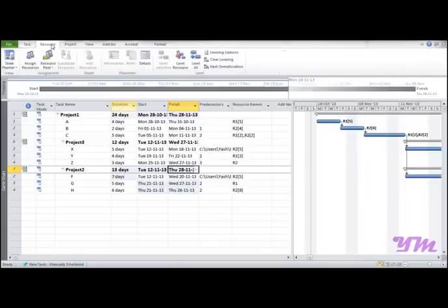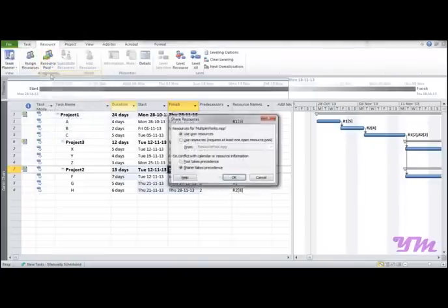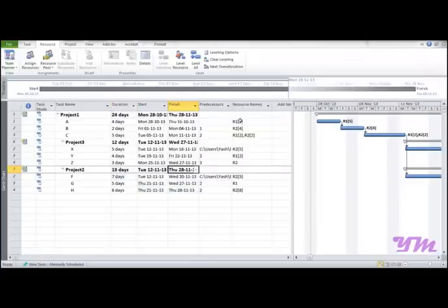Now we need to add resources here again as we did previously, that is to go to resource pool, share resources, use resources from, select the resource pool.mpp file and press OK. So now the resources are again being connected with this file too. Now we have connected the 3 project files with 1 resource file and finally clubbed all of them into one single file. So now making a change in any one of the files will also make the changes in all the files.